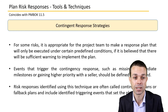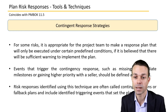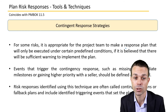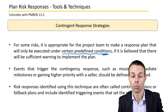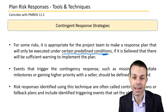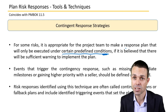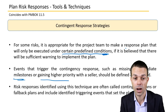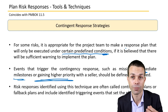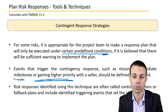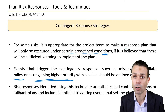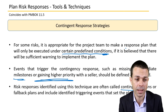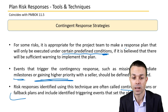Contingent response strategies apply to risks where the project team makes a response plan that will only be executed under certain predefined conditions — if there will be sufficient warning to implement the plan. Events that trigger the contingency response, such as missing intermediate milestones or gaining higher priority with a seller, should be defined and tracked. Risk responses identified this way are often called contingency plans or fallback plans, and include identified triggering events.